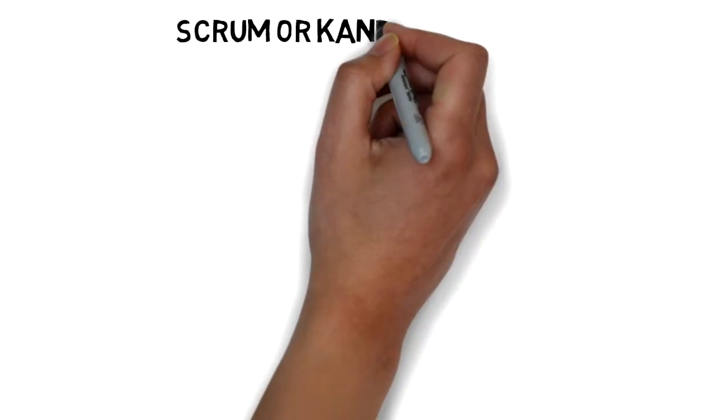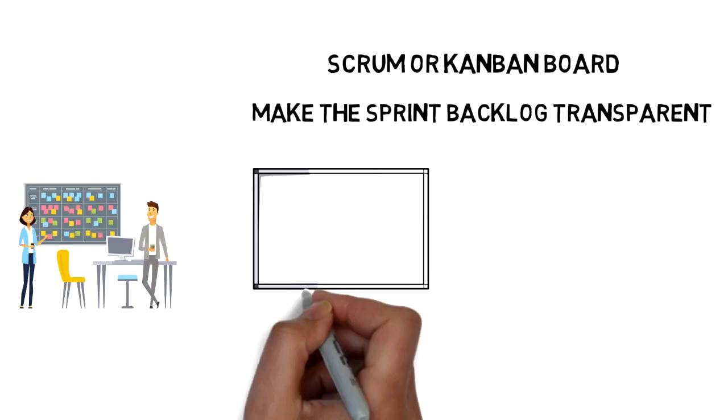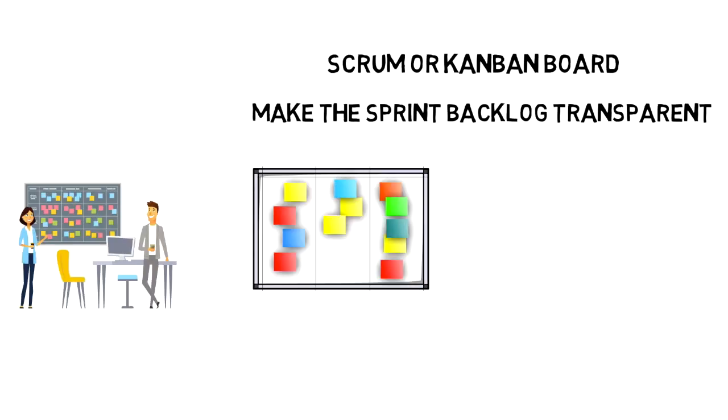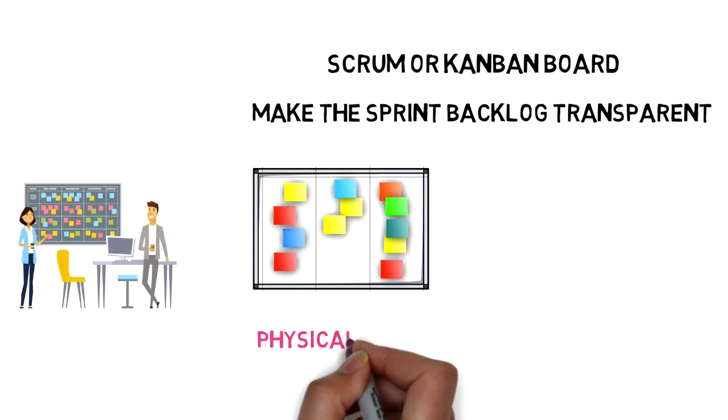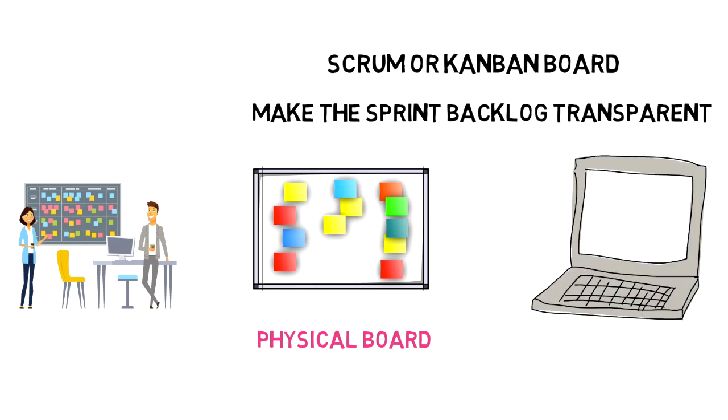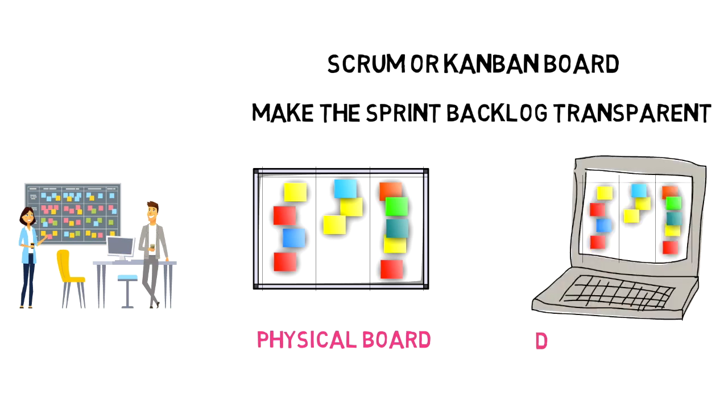A Kanban board or a Scrum board is a tool that helps teams make sprint backlog items visible. The board can be physical using whiteboard and stickers or virtual using different softwares, and in both cases it performs the same function regardless of how it looks.